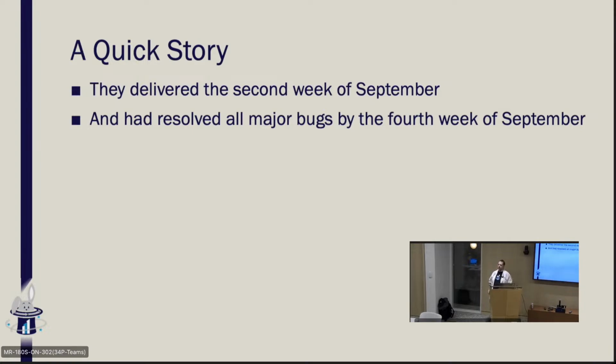Was it that I had a crystal ball or some magic? No, I just used their throughput. I used their data. And even though the work they were doing was different, it was similar enough to the work that they had been doing that the data still held through.